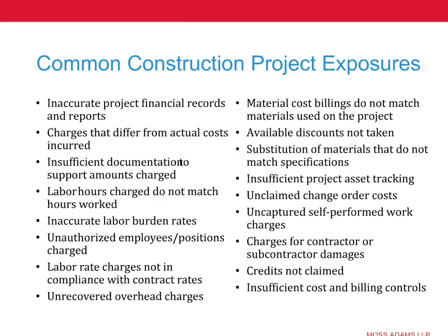You could end up severely underbilling or overbilling if you're billing on a cost-type contract based on the percent complete of budgeted schedule of value items. So it's extremely important to have good cost reports, good reconciliation of those cost reports, understanding what's in the cost reports, and making sure that the costs tie out. I can tell you that on probably 20 to 25% of the projects we look at where the contractor is used to doing work on a lump sum basis, the cost report doesn't tie out, and that's the first thing we look at. Essentially, that's the first thing an owner is going to look at. So you've got to have a good process for handling and addressing that, and it's just a common construction exposure.